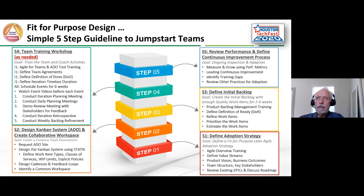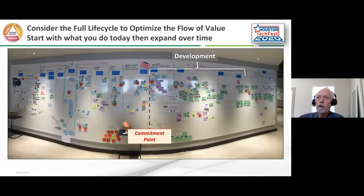And then we bring the team in and train the team up on how to navigate the tool if they haven't done it before, and how we need to tag data for exceptions, and so classification of work exceptions. And that's really it. The team operates for about 4 to 6 weeks. Then we have enough data that we can start looking at where their bottlenecks are and how they can improve. And that's the team level steps for implementing it.